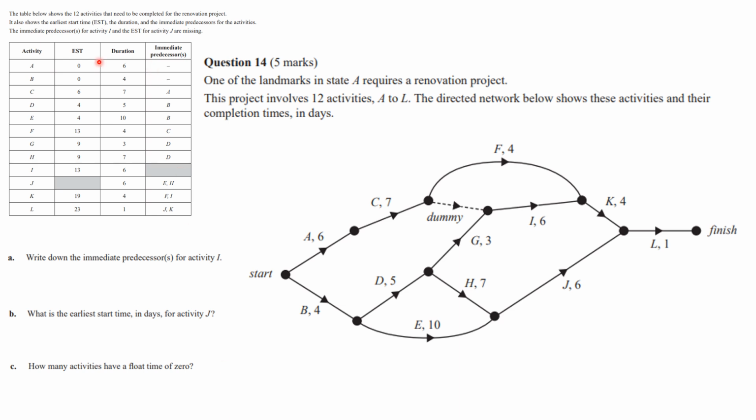2023, Exam 2, Question 14. Now we've got this precedence table here. It's got a couple of grey spots because that's the answers for A and B of this thing, and you can see we've got this dummy here that hasn't been mentioned, because normally when you've got a dummy there should be some sort of conflict in the immediate predecessors. Let's just highlight what's going on here. So I to G, but also I through the dummy to C, and so that's why you should have C, comma G there. So the answer is the immediate process C, comma G. Do not write down the dummy unless you are a dummy. That's the trick they're trying to play on people there.